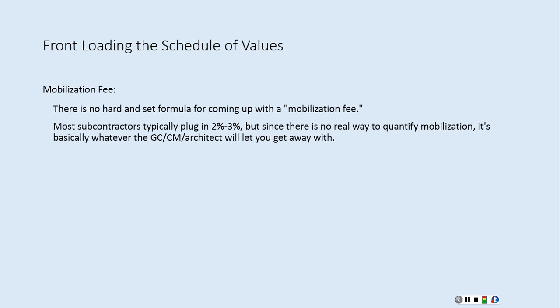When we look at contracting, it's kind of a strange business. We go through and do a lot of this work, and we wait for it to be justified that we actually did it before we get paid. So we're always extending our credit, extending our monies every month. We pay the people that are working for us every week. We don't get paid for their work until the next month.